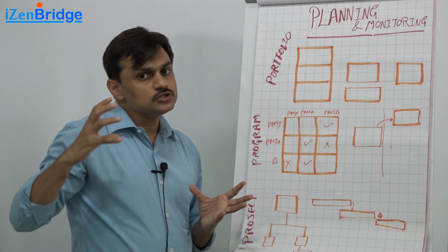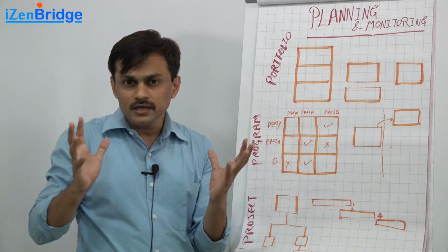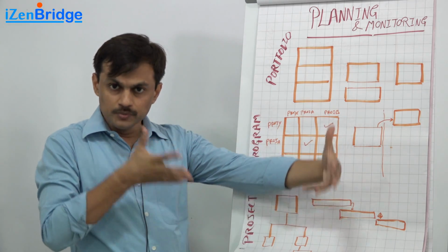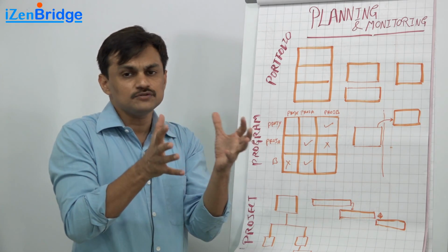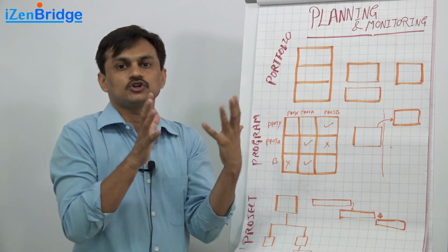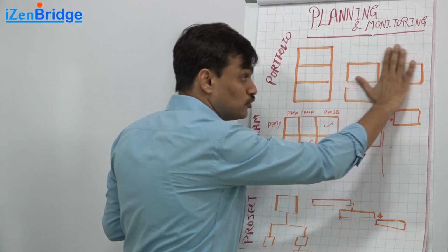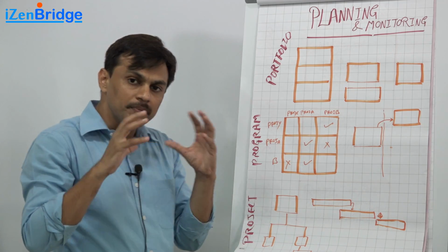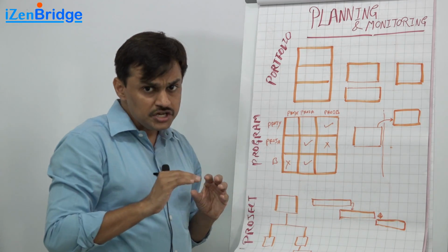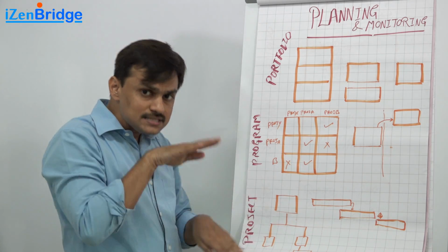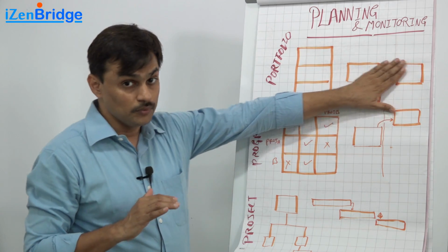The portfolio planning also deals with capacity planning. So they think of, yeah, we can do a million things, but as per our human resource and organization resources, we can think of these many things we can pick up. So we will only pick up the top 10 initiatives. So that kind of capacity planning is many times done at a portfolio level. At portfolio level, we also do a lot of budgeting and money allocation. So how much money can go into a particular initiative, and how should we adjust that money with the changes in environment? That is something done at a portfolio level.